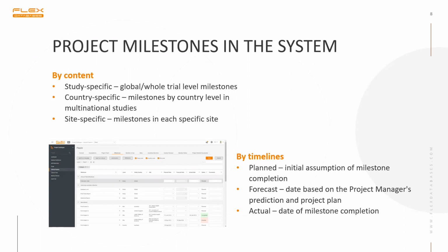So first here we have a date that is the planned date. For example, it is the date that the BD team of Acero discussed with high-level management of the sponsor, the date that is written in the contract, or the one we were hoping at least to reach in the very beginning or during the study planning, which is the plan date. Then the project begins with the team, and the project manager predicts their own expectations, and that would be the date that is expected to meet. So the forecast date. And finally, the most important date here is the actual one, actual date. Well, here, I don't think we need further explanation apart from it is the date when the milestone is achieved. So we will see now how these levels work.